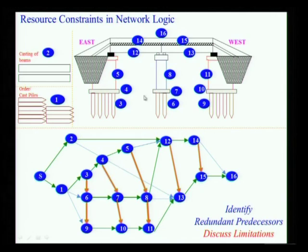Similarly, I am assuming all of this like 4, 7, 10 need the same crew, 5 crew and equipment, 5, 8 and 11 need the same. So I am just assuming symmetry and putting this through. Now, do you see anything in this network which you would change?